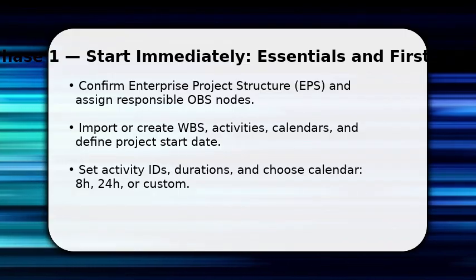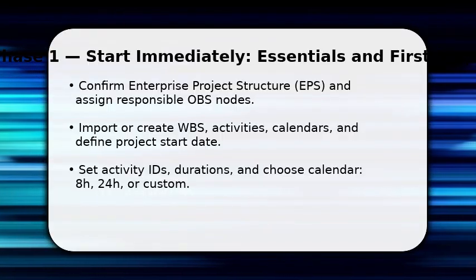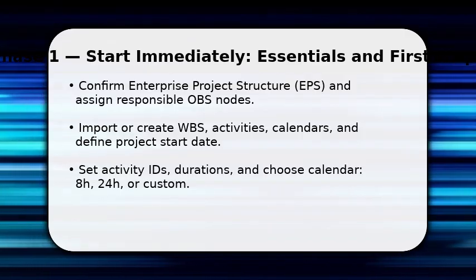Make sure to import baseline data if available. Baselines let you measure progress. Finally, check activity types, task-dependent, finish to start relationships, and save the project before moving to resource work.